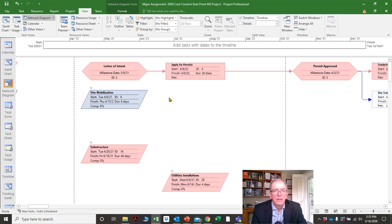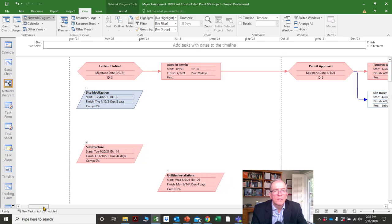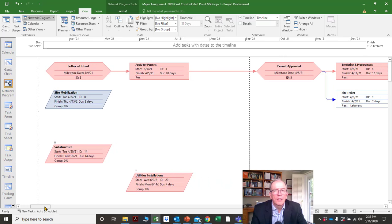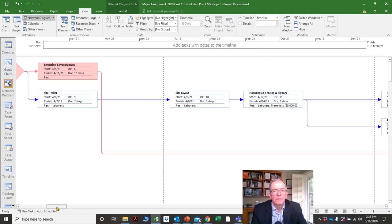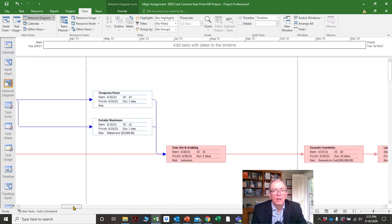All of the activities, if you scroll along, are all actually connected. From tutorials 1 and 2, we know we don't want any open ends — an open end is when one activity is not connected.